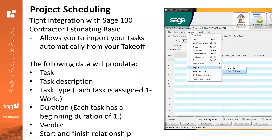As you can see on the right-hand side, you go up to Options, then Import, and you can bring over your takeoff tasks from there. All of the following data will populate: task, task description, the type, the duration, the vendor, and the start and finish of the relationship. You can then start building out more detail from there and really streamline the process between estimating and being awarded the job.